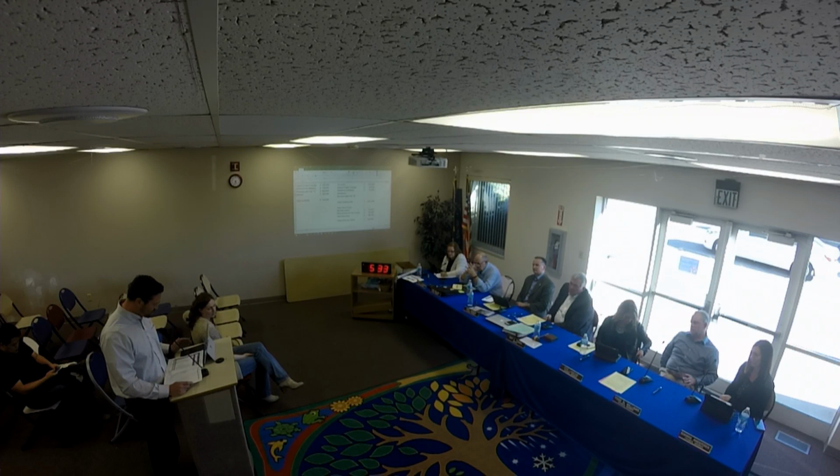Currently, we're on target to hit December 6th for completion of the fire station. So that's good news. We had tentatively planned originally January 7th. We have a 30-day window there that we can finish some of those items that you guys may see and say, hey, this needs to be changed a little bit. Punch list items, any holes in the walls that your furniture guys put in, stuff like that.